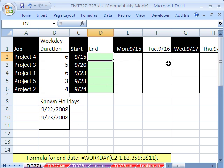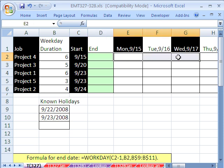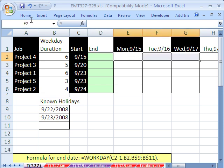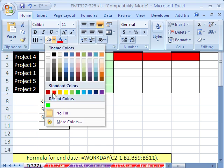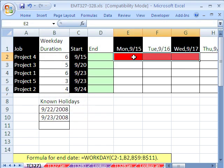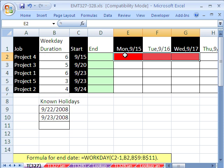And then we'll do our conditional formatting, because our ultimate goal is to have red in the cell for the full length of the project. Six plus any holidays plus any Saturdays and Sundays will give us the full red range.